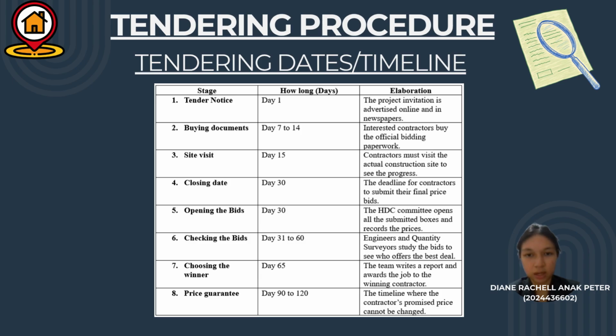Phase 2 Submission Day 30. This is the closing date deadline for final price bids. On the exact same afternoon, the HDC committee opens all the boxes and records the prices.